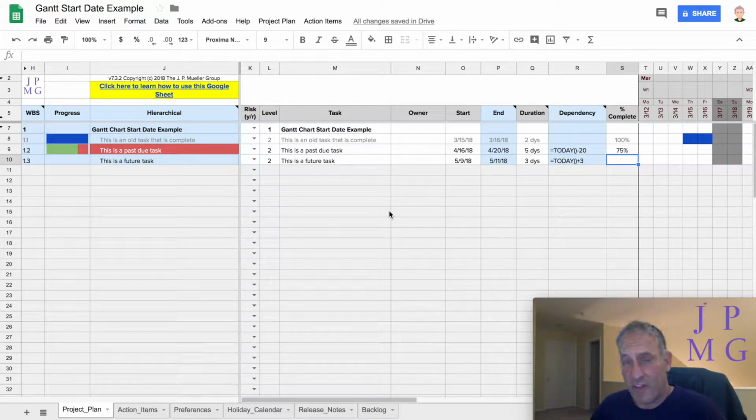In video 5, Gantt chart manipulations, we discussed how the Gantt chart starts in the earliest date of the earliest task on the plan. So in this case, we have a task on 3/15, so we show that week as the first week of the Gantt chart. Now, it's currently May 6th at the time of this recording, and I also showed in that video how to change on the Preference tab the Gantt chart start date to be the current day by putting the equal to day function in that field.